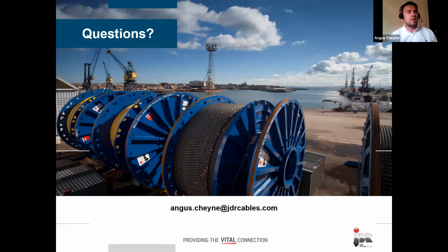A lot of the offshore work that's done in terms of abandonment is considering that you wouldn't have to retrieve it onshore, as it obviously introduces a large amount of cost and delay into the schedule. It would depend on the product in question, but most of the testing could be performed on the vessel. But certainly, please get in touch and we can discuss further.